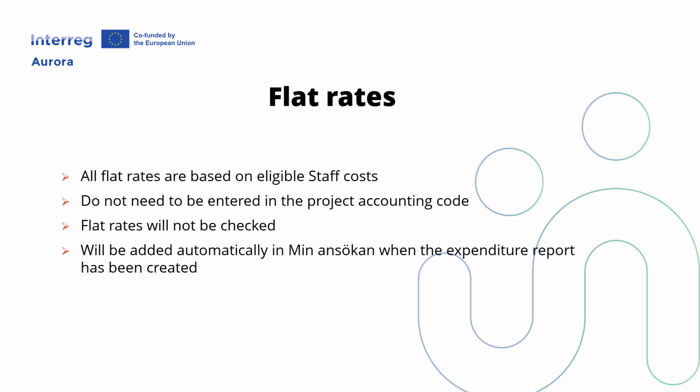Now we will inform about the flat rates, which are based on staff costs. Applicable to all flat rates, they are directly linked to the staff costs, and they are always based on the final eligible staff costs. If staff cost would be reduced by the controllers or other program bodies, also the flat rates would be proportionally reduced.